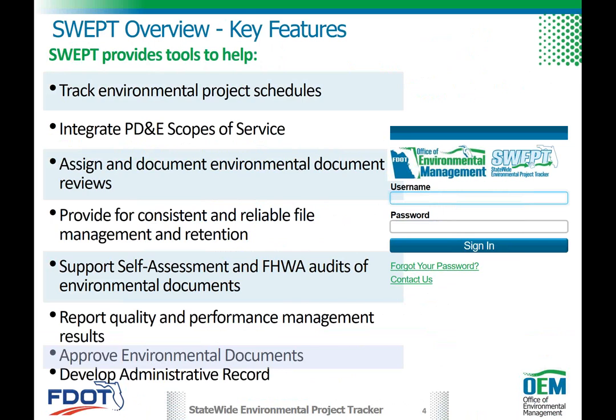It allows us to look at timeliness and report back our quality and performance results, which are also required back to Federal Highway Administration. Part of NEPA assignment is, can we do it faster as a state than they did it as a federal government? So to do that, we've got to be able to track how long it's taking to complete various milestones and report on that.